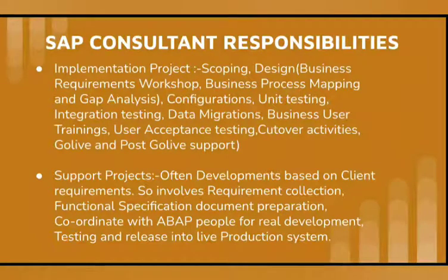Then this data migration activity will be started from the testing client, the pre-production client and the production client. These activities need to be conducted in parallel along with configuration, unit testing and integration. So this is a parallel activity that needs to be conducted in phases, like Mock 1, Mock 2, Mock 3, and Mock 4.